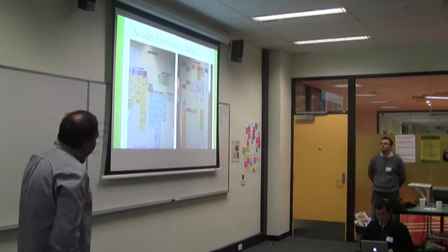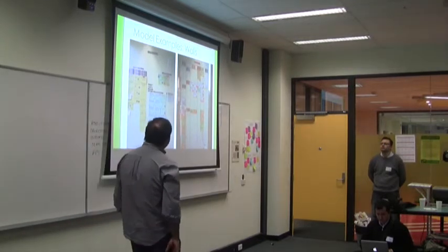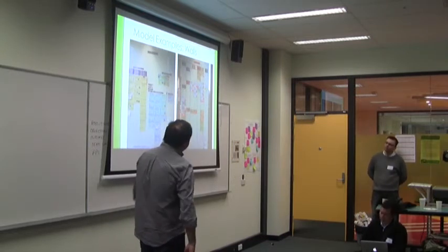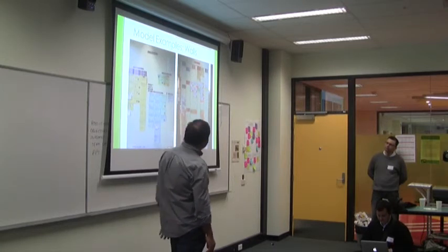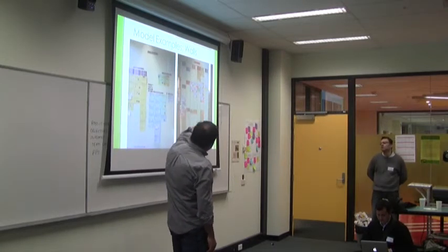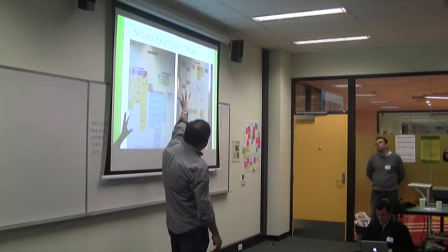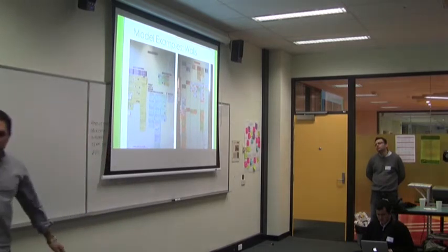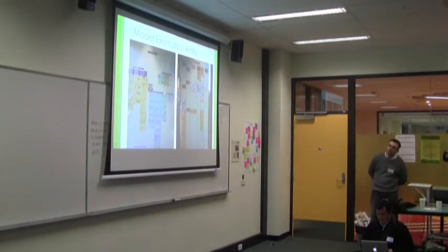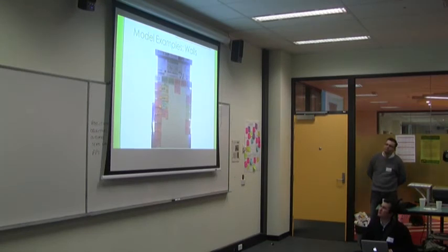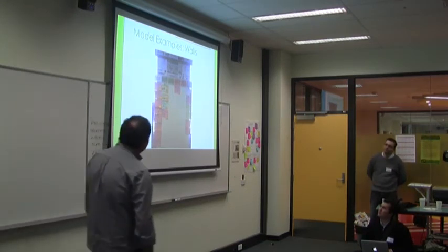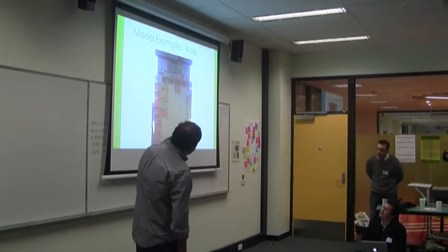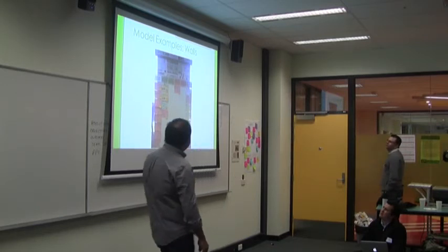Then the PMs felt a bit left out, and they said, Reg, can you give us a wall? I said, yeah, I'll work something out. So I put something up, and then they refined it. So these are all the work requests that come in, and we had different sections for each PM, and my section was the Agile section. And that went through to done. They loved that. They took really good ownership of it. And then the BAs felt a bit left out. So we came up with this BA wall. And so their workflow was a bit different: ready for analysis, in analysis, complete, in review, complete, and done.